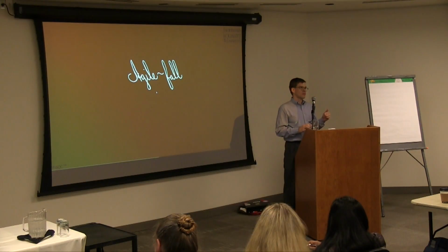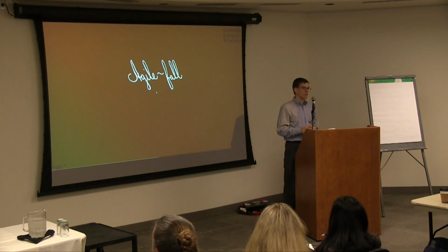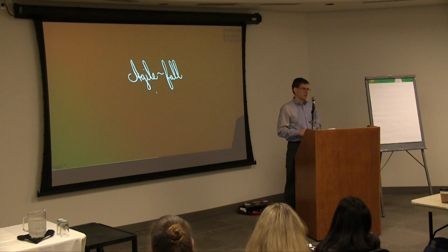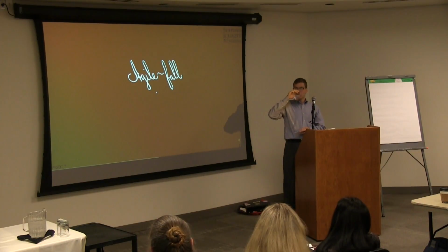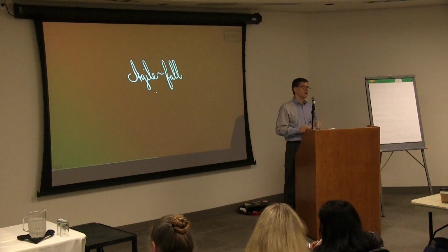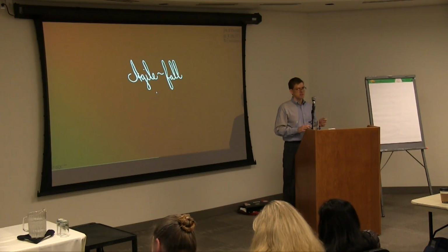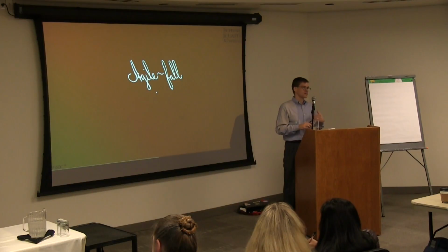So QA would get involved with the development teams and the product owners early on in a feature cycle to help flesh out the requirements gathering and produce comprehensive test plans for the feature that would be developed. Once that test plan was signed off by the various stakeholders, including the product manager and the lead developer for the project before it kicked off, we would then wait quite a while. Although the development teams were using the Scrum framework for their work, they had culturally, because they were not involving people that were testing it, they were not producing testable artifacts at the end of their sprints. So quite often, it wouldn't be until very late in the development cycle that the development teams were able to produce a testable artifact that QA could consume.